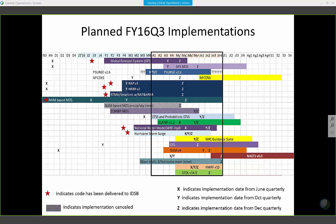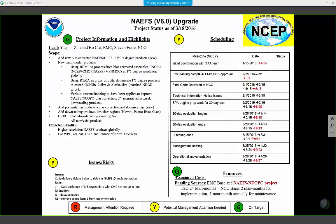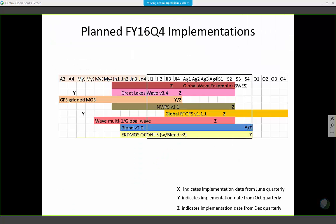The only other thing I would suggest from an NSEP and MDL interaction is making sure that the versioning of PSearch and the implementation schedule for the tropical program that NHC and the National Tropical Program are expecting are in sync, so that we're all talking about the same thing. Yeah, two drivers. One, PSearch is an AOP milestone this year, and second is the impact it has on meeting the storm surge watch warning implementation. Those are the two connections. Just to make sure we've checked that, so it's not like, oh wow, we didn't think of that connection.